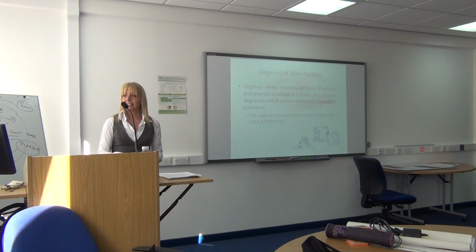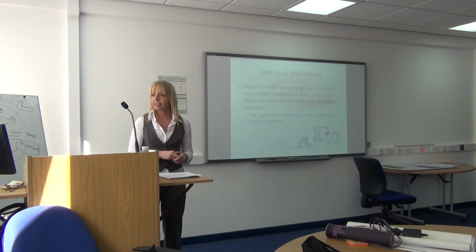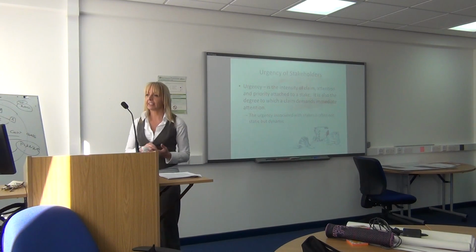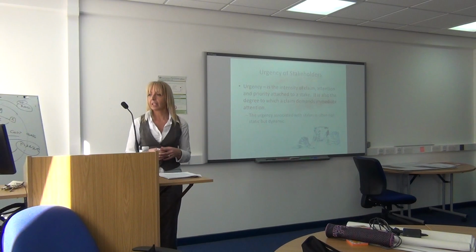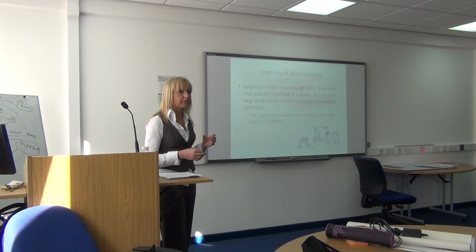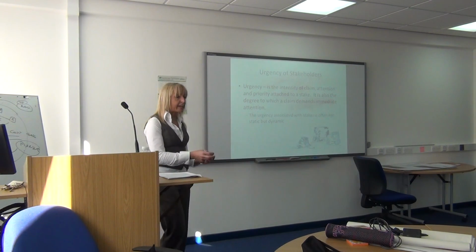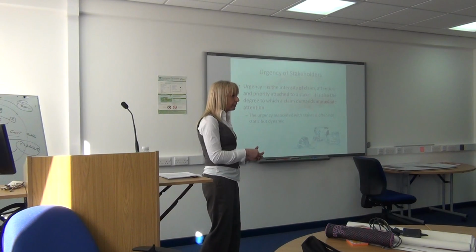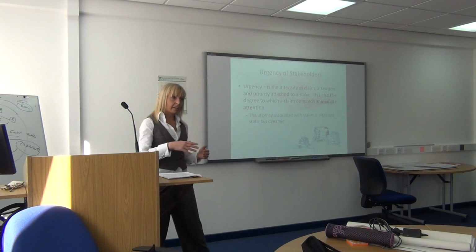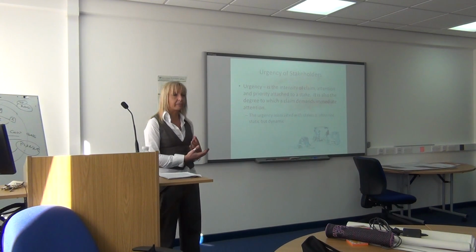And the urgency is the intensity of the claim, attention and priority attached to the stake. It's also the degree to which a claim demands immediate attention. So it's associated with stakes, and is often thought of as static, but it's not static, it's dynamic. Again, the urgency of a stakeholder at any one point in that project, any one point in the acquisition, may differ at different stages. So this whole process is very dynamic.